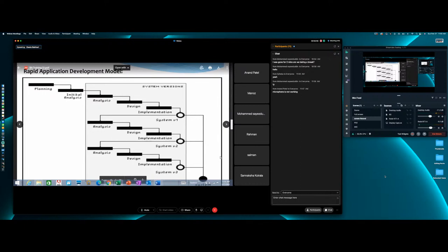Stays the same. What you're effectively doing is you are taking the length of the time. What was the length of the time for traditional? 18 months. And you've converted 18 into a 6 months, which is a factor of 3. You've reduced it 3 times, correct?